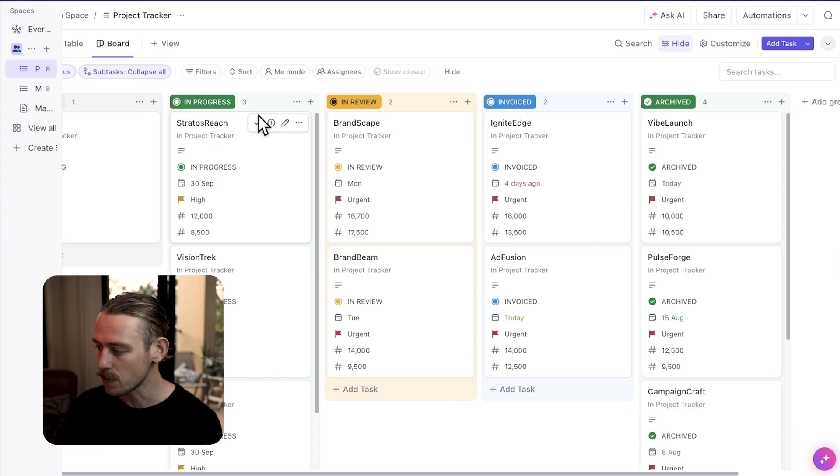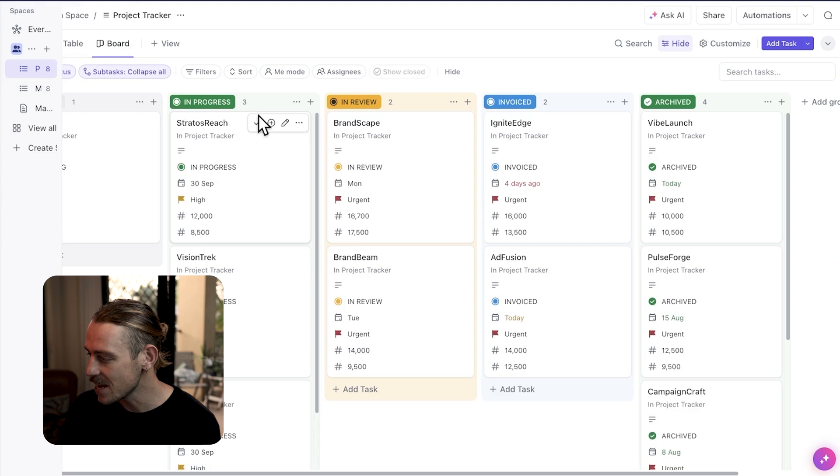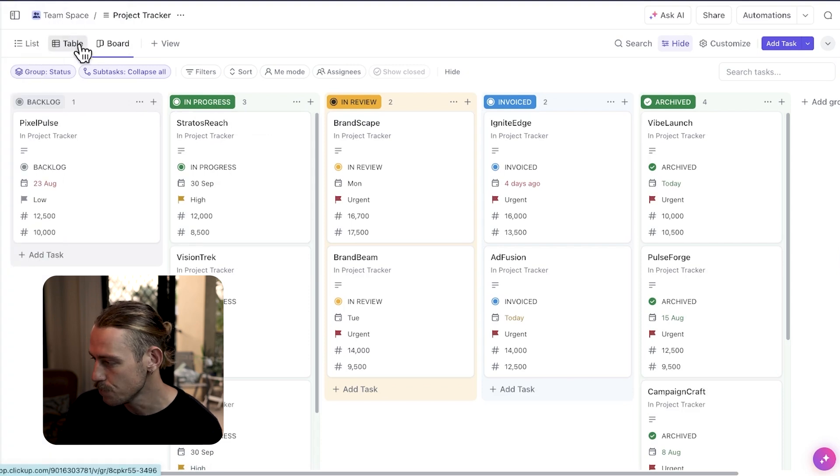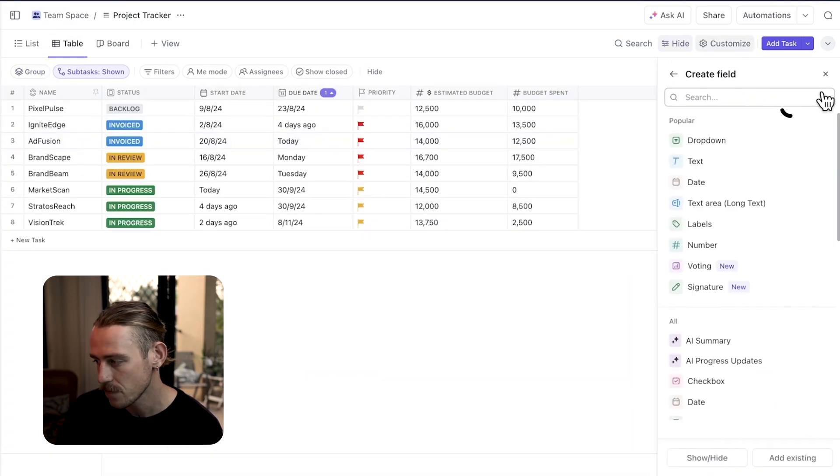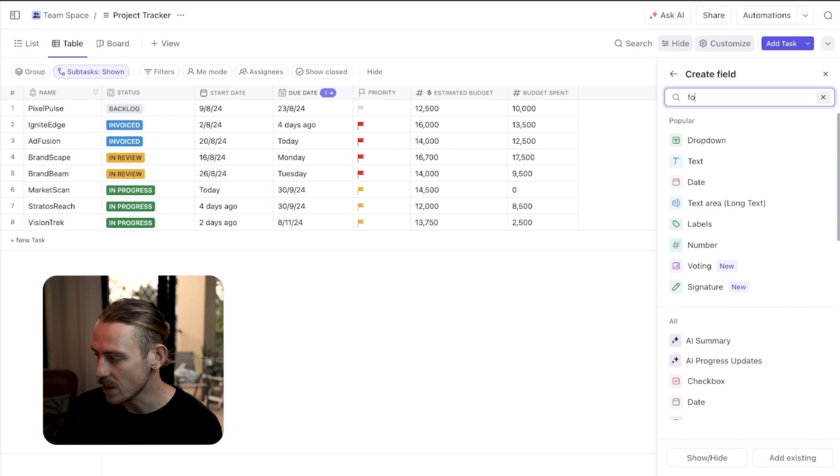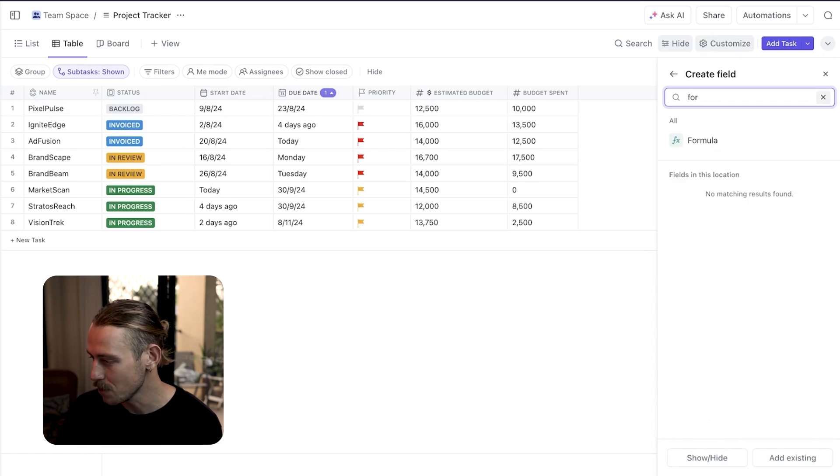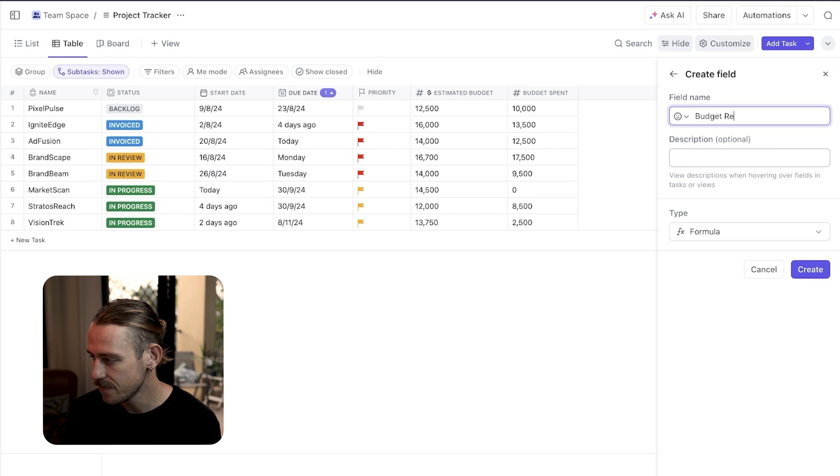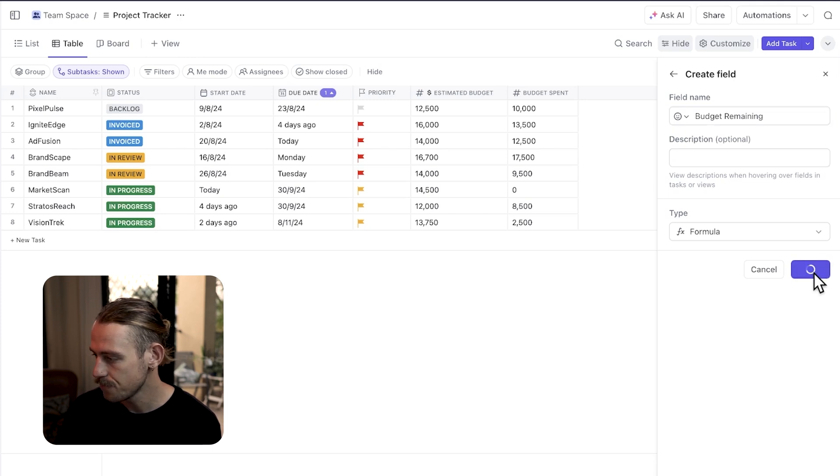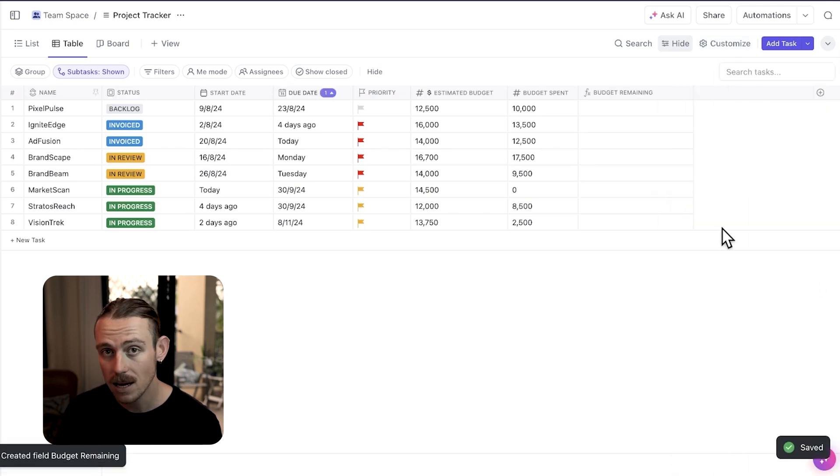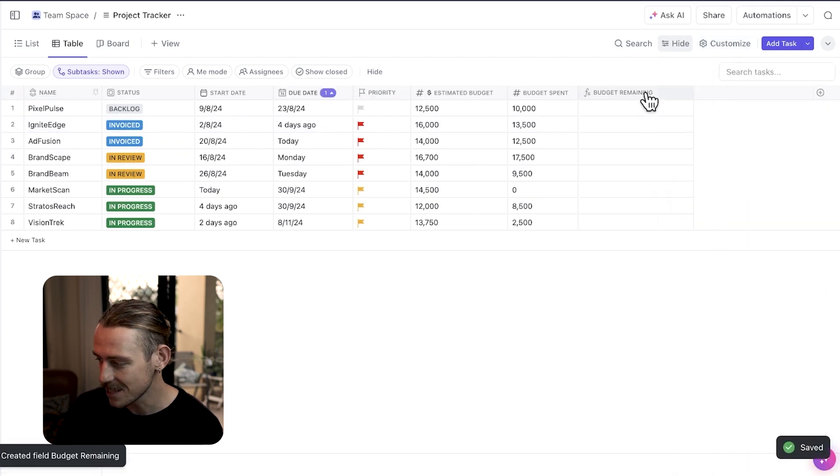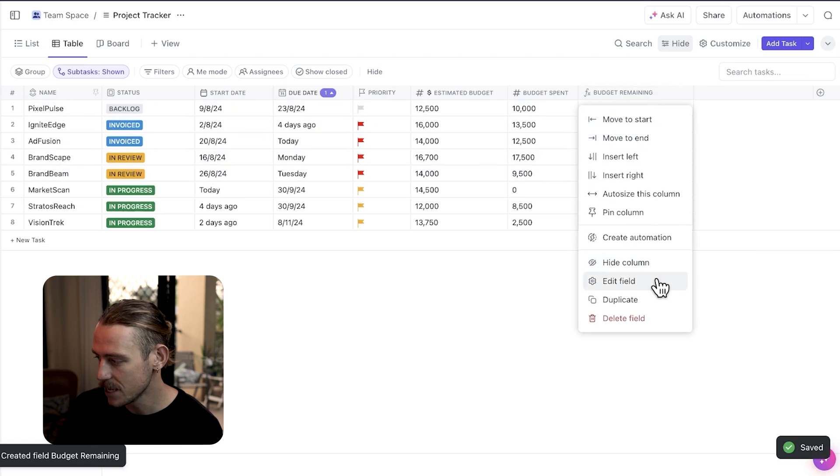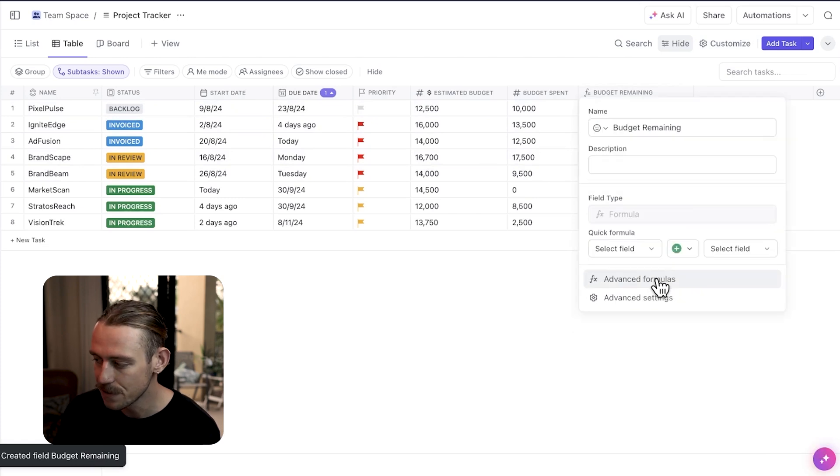To add a formula field, head to the end of a view. I'm using a table view. Selecting this button icon adds a new field. Then selecting formula from the options, give it a name and select create. Now, you'll want to select the formula field from the column and select edit field.